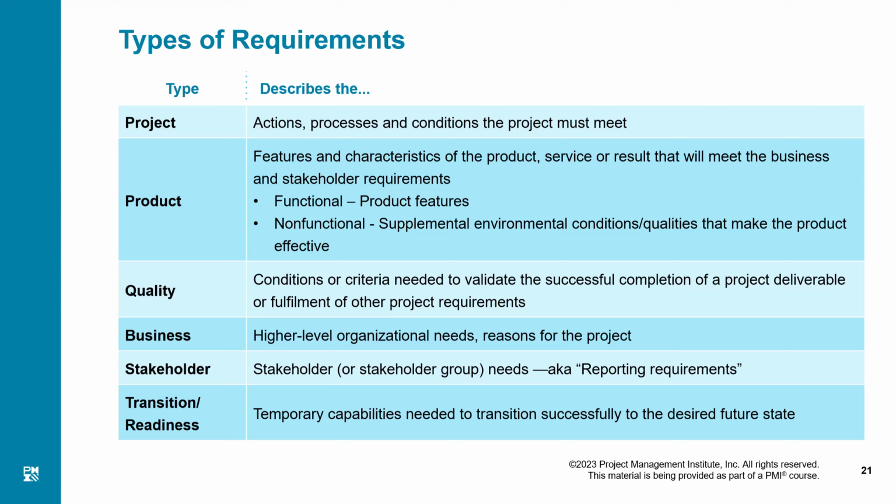I'll ask the customer, okay, if this kilometer is say 10 feet plus or minus, will it matter to you? Will you accept it? They will say, no, 10 feet is too much. I say, okay, if it is 1 foot plus or minus, will that be all right? Customer said, well, not really, but you can be a little bit more accurate. I say, okay, up to 3 inches, plus or minus. They say, okay, that is fine with us.